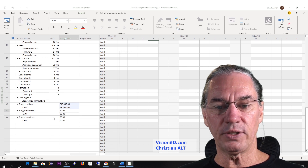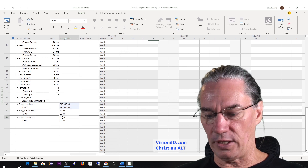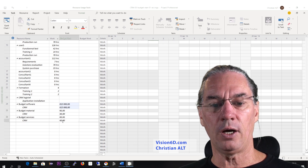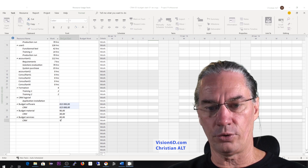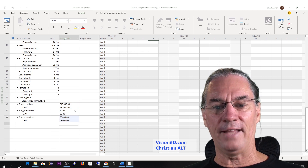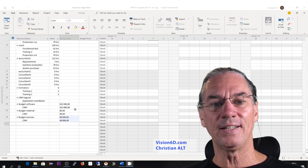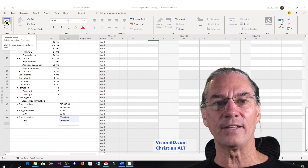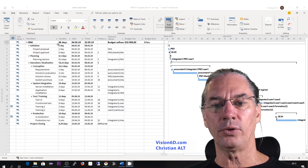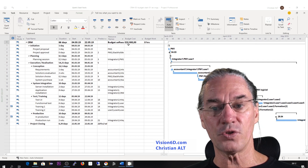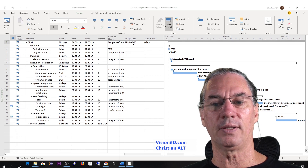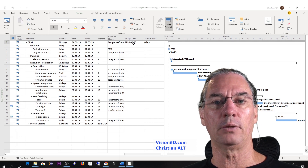I will try to put it directly on the budget line here. You see, MS Project doesn't allow that — it's really on the line of the task that you have to enter a value. So now we've entered the costs. We can go back to the Gantt chart and look at what happened. We see that on the CRM line, we now have our first change — a budget cost of 23,000, which is really 15,000 plus 8,000.